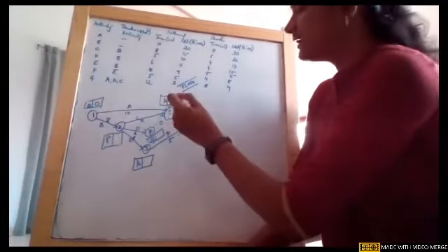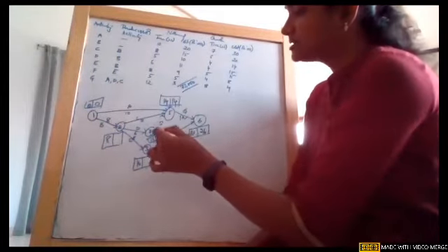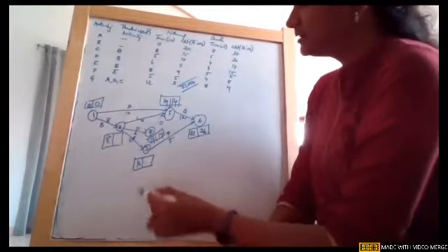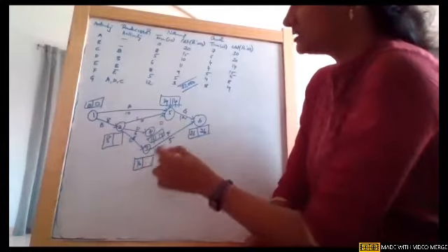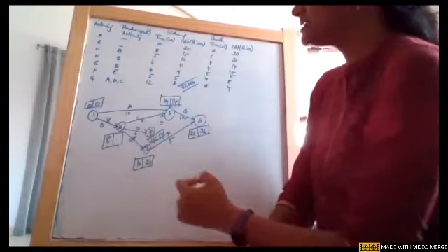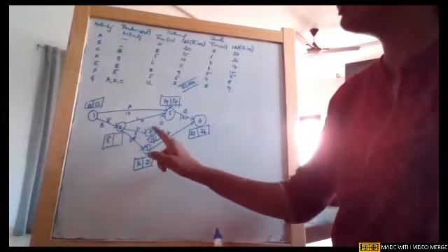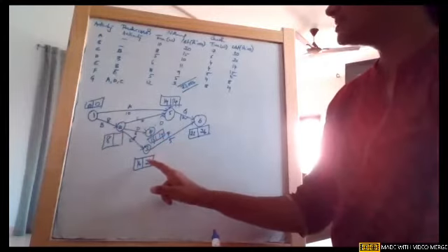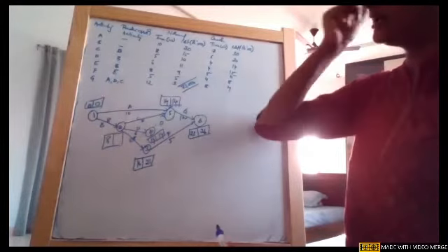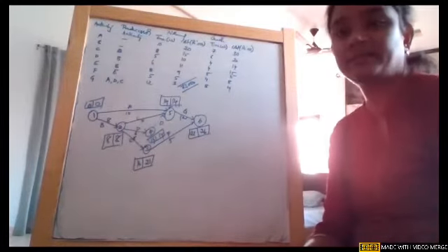So again we will find out the latest also. 26 minus 12, it is 14, and 14 minus 0, it is 14. At node 6, 26 minus 5, it is 21. Node 2 has 3 tails. One tail is giving 14 minus 5, 11. The other tail is giving 14 minus 6, 8. One more tail is giving 21 minus 8, which is 13. So the smallest value is obviously 8. So this is how we completed the network.